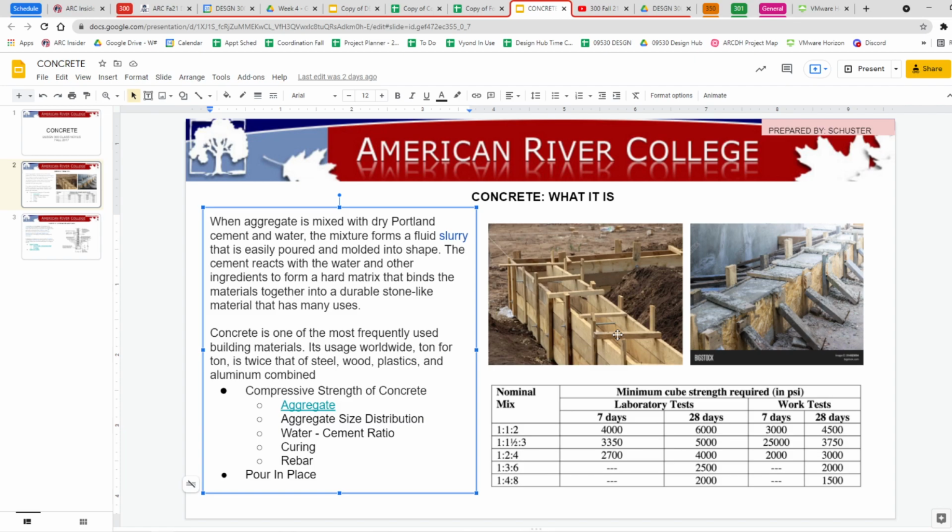it to get strong enough, cure, become stone like enough, and that's just a chemical reaction between water and cement. Okay, and the cement coats the aggregate and holds everything together. And it'll take about a day to get to strong enough to remove the forms. Maybe sometimes they wait 2 days or three. And then you like to be able to remove the forms so that they are reusable. Okay, so this piece of CSX or particle ply, you take these braces off and pull these off and just pull that out, and then that will keep its shape. That's the idea.